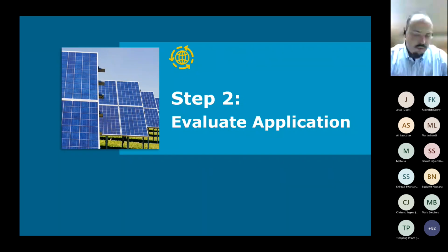What we've already discussed this morning is the evaluation, and whether you first issue a cost estimate letter and then a budget quote after that, or whether you just issue one quotation for the customer to be able to do the physical connection. That depends on the municipal distributor, on your requirements, the number of applications that you receive, as well as how you deal with the process.